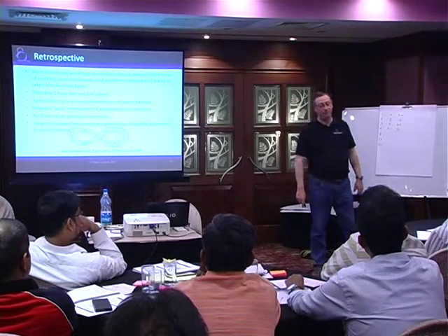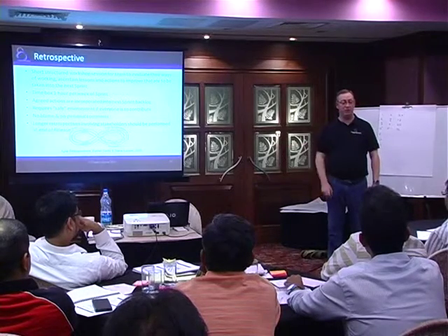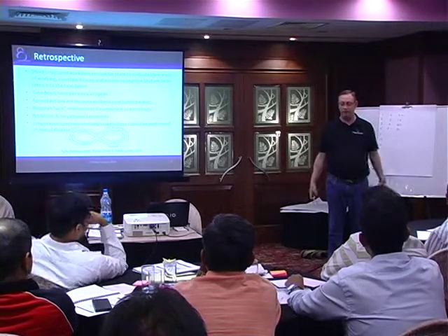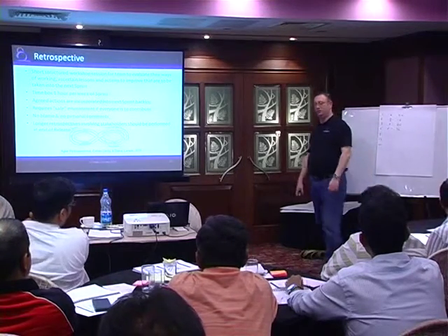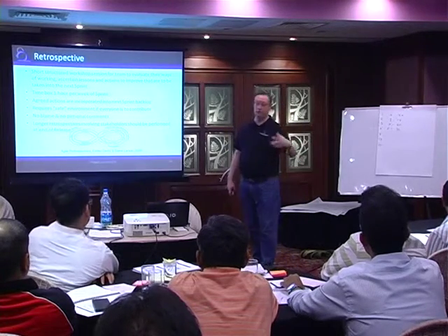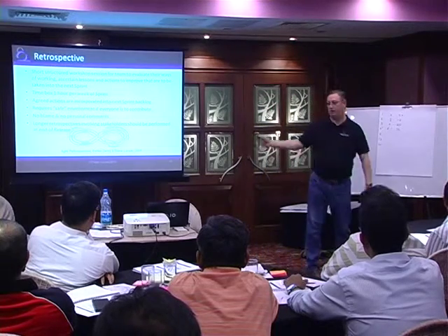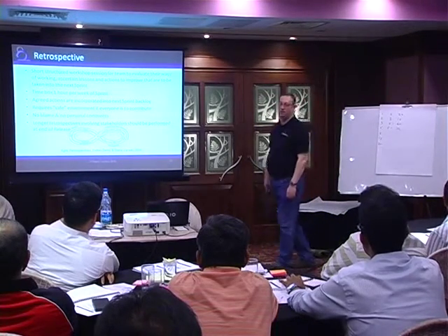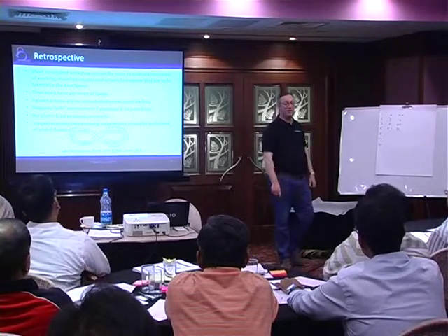There's very little difference between review and retrospective. Well, there is, because the review is all about the product. This is about the team and how they work. They've got completely different focuses. They're completely different meetings. Sprint review is all about, this is the product we have now. This is what product we think we're going to build next. Is that the right thing to do? This is about how, now as a team, this is how we did things in the last sprint. Can we do things better? Can we be better as a team?